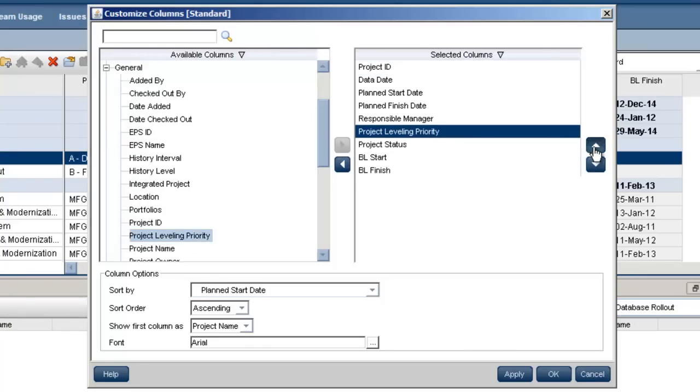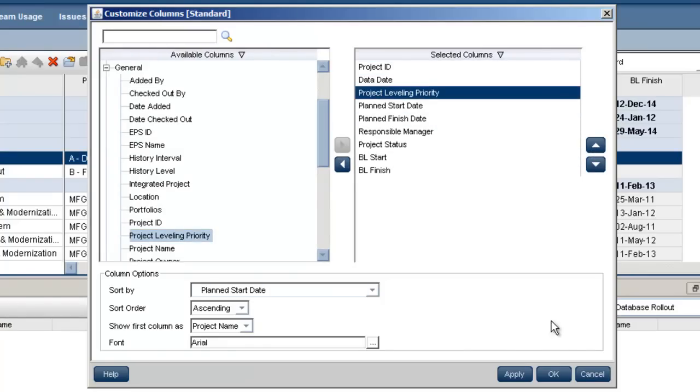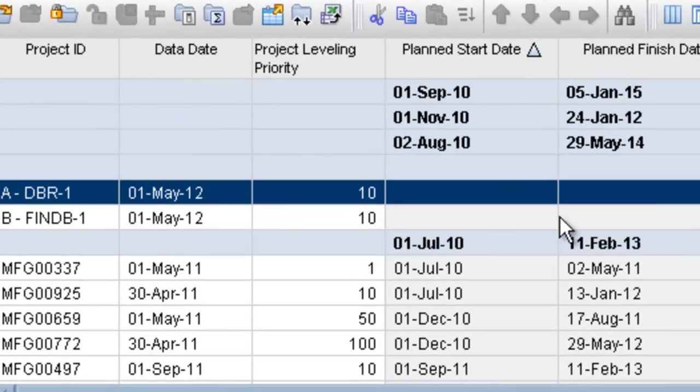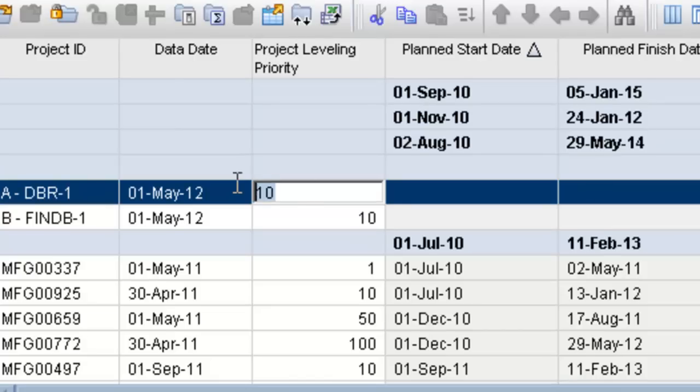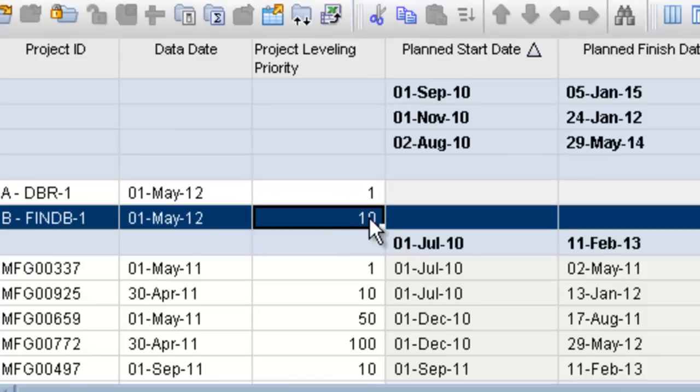Next, set the priority for the projects. In this case, project A is set to 1, being top priority. Project B is set to 10, making it lower priority. The values you can use in this field range from 1 to 100.